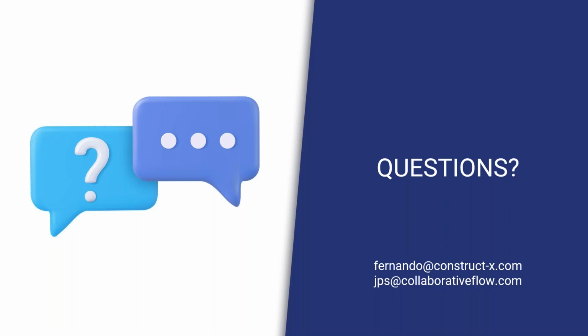That's also a big advantage of using one of the databases. I showed you a few screenshots of one developed in QuickBase. That is what greatly enhances your ability to manage and control your scope: FSBs come into and out of a project as a unit, and you can see who is affected pretty quickly. I hope that was helpful.